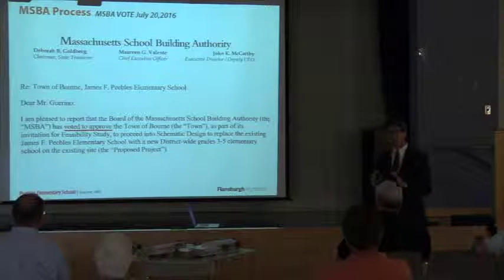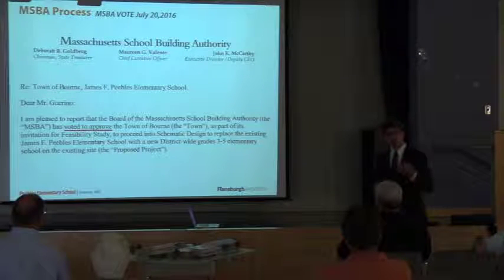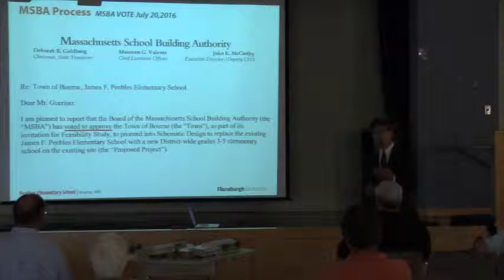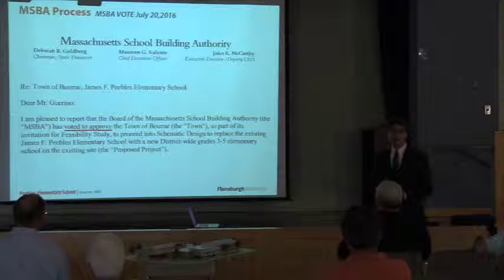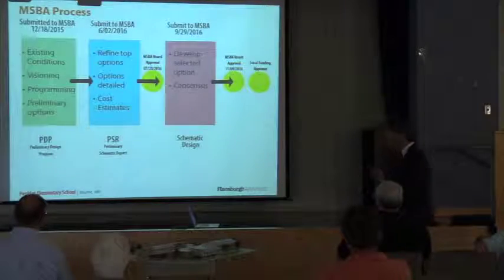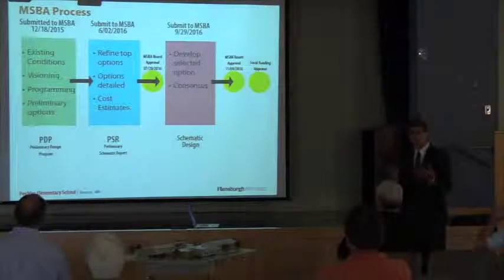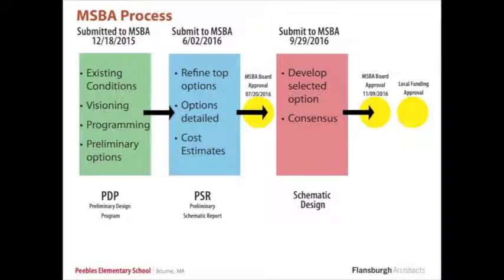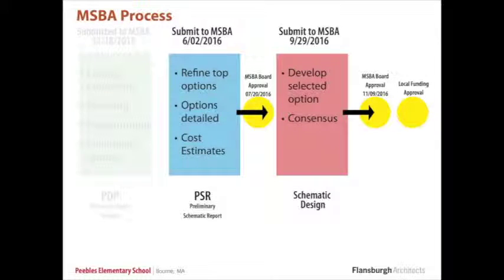So it's a very, very significant, very, very important milestone for the town, which gets us closer to realizing that very, very significant grant from the state. The MSBA process, as I said, is a very regulated process. Within the feasibility study itself, there's three main phases: the preliminary design report, or PDP phase, the PSR phase, or preferred schematic report, and then the schematic design.